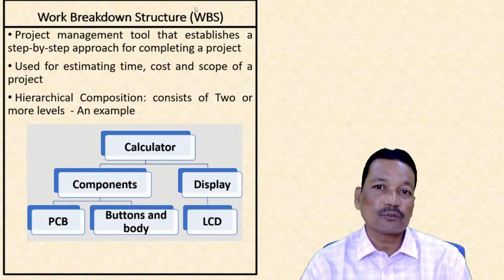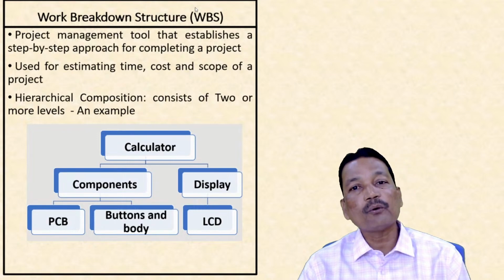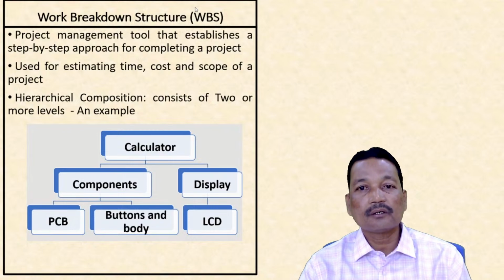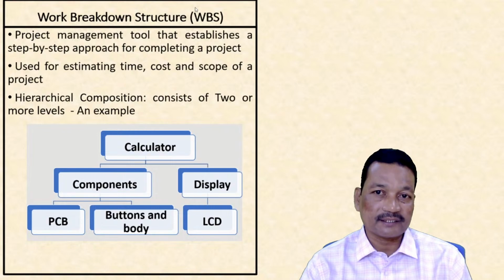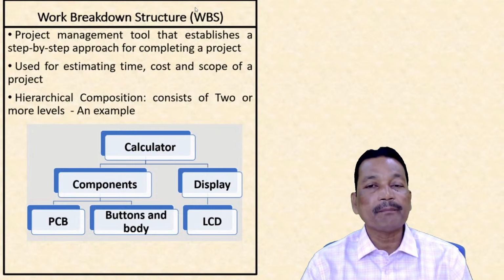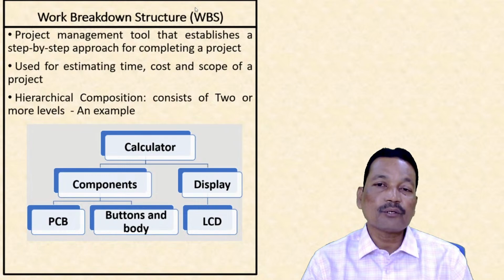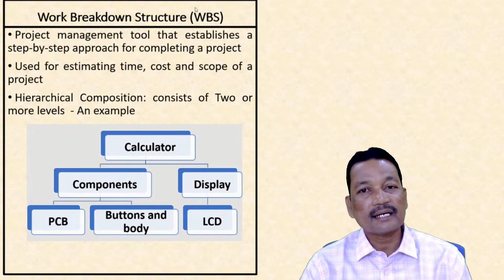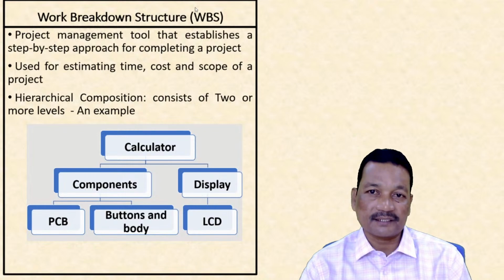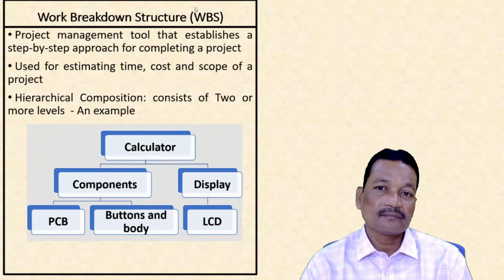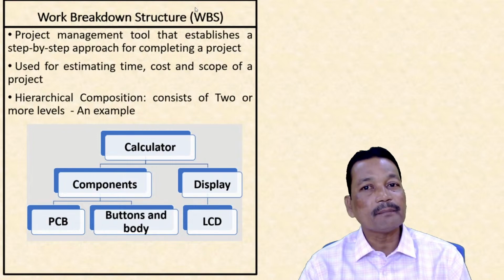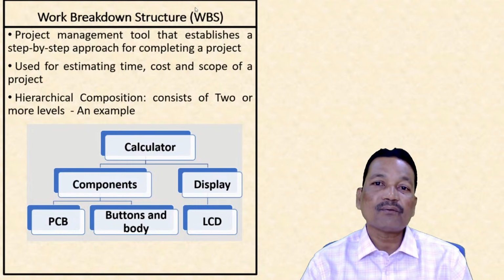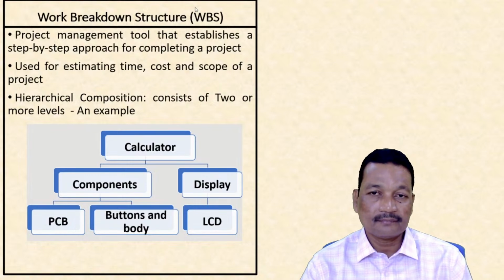Now let us talk about cost. Suppose the wooden writing board costs us 200 rupees. The iron frame costs us 250 rupees. And the 10 screws are costing us 50 rupees. So the total cost of the table is immediately estimated at 500 rupees.